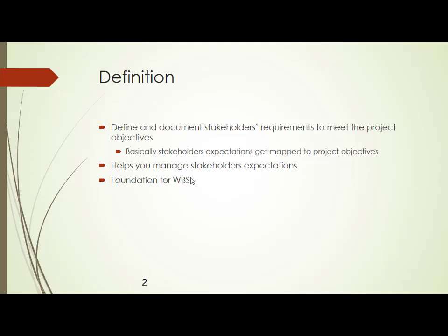And we identified the stakeholders. We took one example of a project and we identified some stakeholders. And you also made one stakeholder register, which you saw in the previous class, where I had the name of the stakeholder, his role, his contact number, and we classified the stakeholder either as a positive stakeholder or a negative stakeholder. And we also saw the influence of that particular stakeholder on the project, whether he has a high influence or a low influence or a moderate influence.